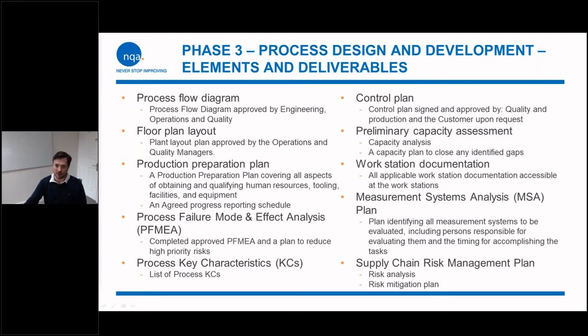Supply chain risk management plan. So, any risk analysis of your supply chain, what mitigations. I've had a client in the past where their main supplier basically burnt to the ground. Their risk mitigation plan kicked in, got all their other suppliers on board, so they didn't miss a single delivery. And then a year later, once the building was rebuilt, everything switched back over. That's because they actually implemented APQP and they had a risk mitigation plan in place.